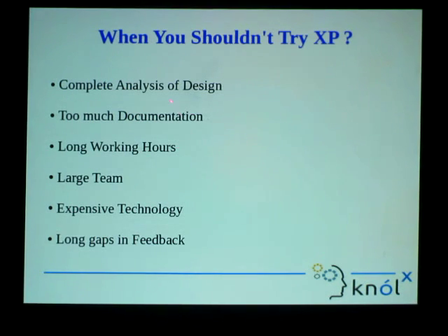in every release cycle or with every iteration in XP. So we cannot try XP where we need to do a complete analysis of design before we have even started working on it. Next is too much documentation. If we have a lot of documentation, for example, in some of the banks we must have seen that they do a lot of paperwork. People don't like doing this much paperwork. That okay, bring this document, bring this document, bring this paper. So that is not an approach for XP because in XP test cases or the tests are actually your documentation. So you don't need documentation at all in there.